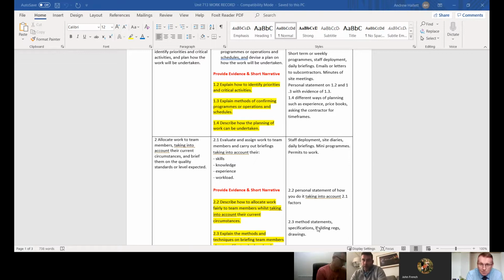It's basically what happens is they'll be given the remit of the works or a drawing. And then within that drawing, it'll be highlighted by the asset engineer all the defects in the tunnel that require works to be done. So then our contractors would look at it and say, right, well, in that area there's 5 square meters or there's 3 square meters throughout the tunnel. So they'll say, right, well, if we've got 2 gangs, we think we can get that done in X amount of time, and basically they'll book what they think's reasonably fit to undertake the works.